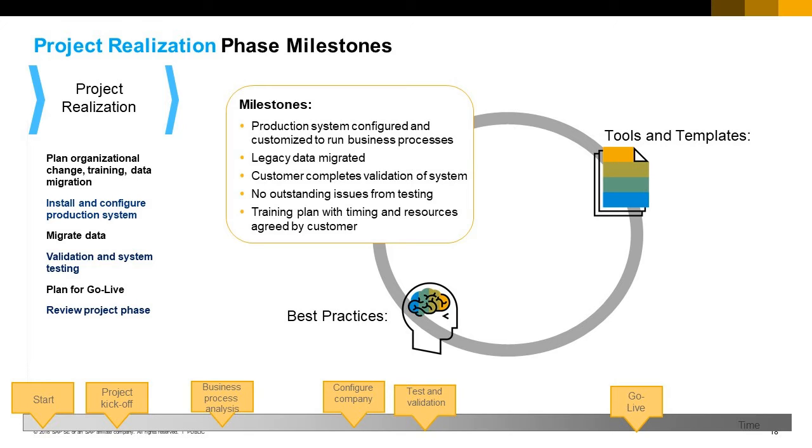You should carefully plan the test cases with the customer. Test cases should cover not just the business process within SAP Business One but the end-to-end process including external system interfaces. The customer should ensure that test plans cover all test cases. The test cases supplied with the AIP can be used as a base for developing procedures for system testing. No outstanding issues from testing.